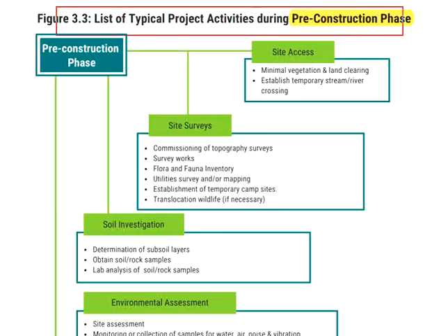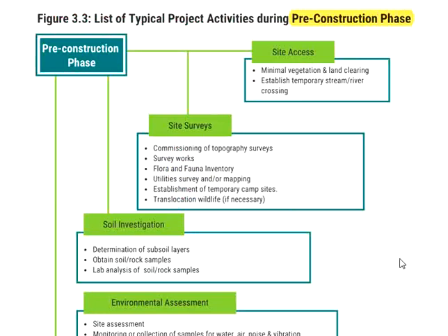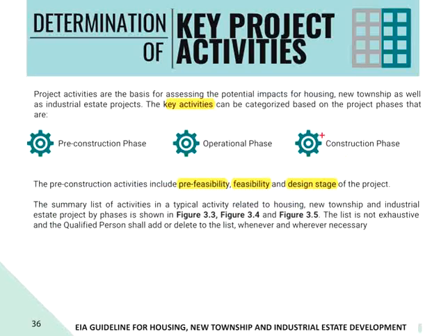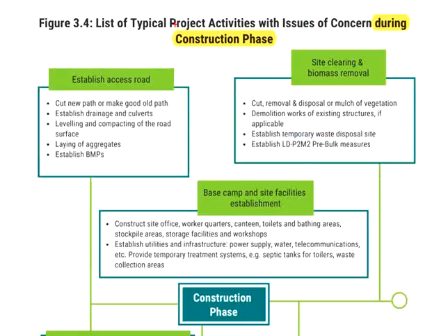This figure shows the typical project activities during the pre-construction phase. This includes site access, site survey, soil investigations, environmental assessment, land acquisition, if any, and then the construction phase. Among the project activities include establishing access road,